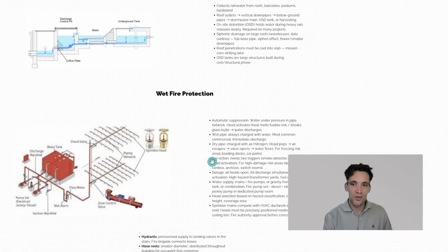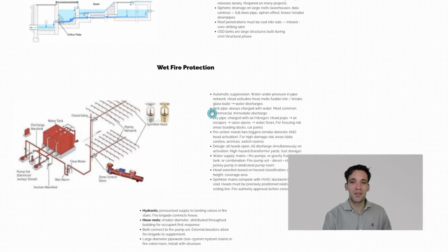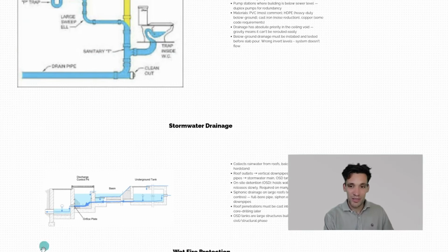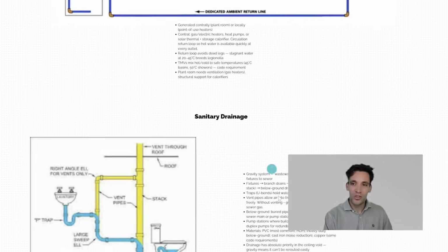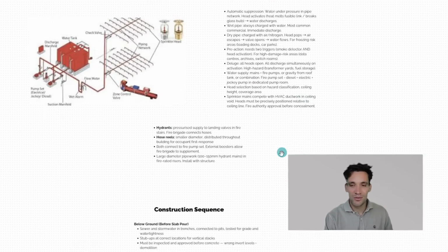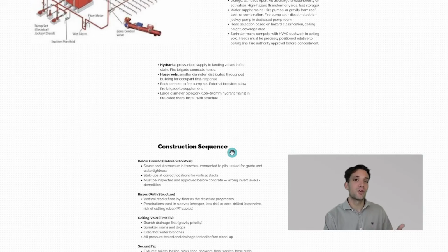And for all of these services, it's really going to come down to 2 things. It's going to be measuring the lineal meters of pipework and reticulation, and then counting things like the number of sprinklers, the number of stormwater pits, the number of hot water units we have. So plumbing quantity takeoffs are very, very simple once you know what you're actually looking at.